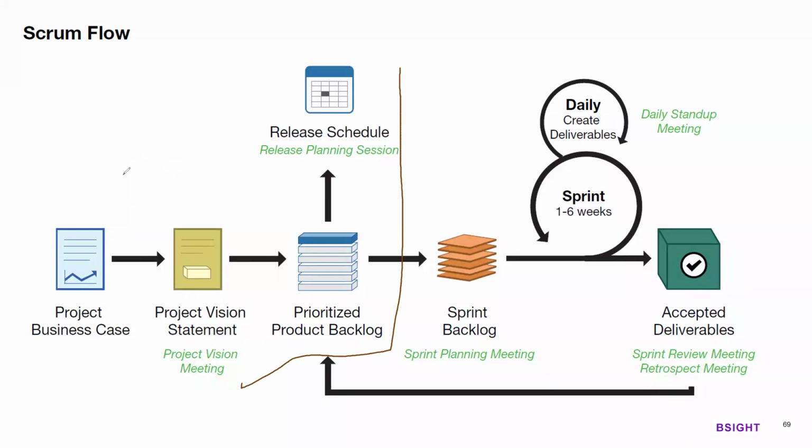There will be a business case and all before starting the project. Only thing it says project. Again, this image is coming from internet. You will have a product vision. There will be a roadmap. There will be a prioritized product backlog. There will be a release planning, and you will have 3 releases: release 1, release 2, release 3. A particular release is split into number of iterations.